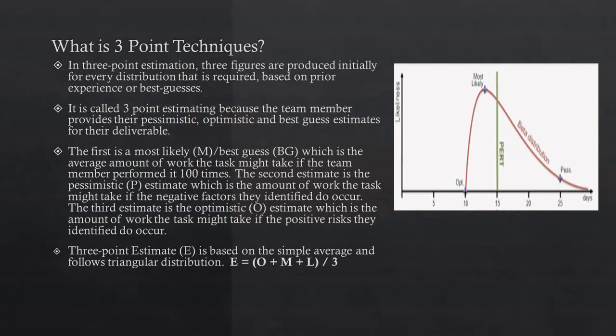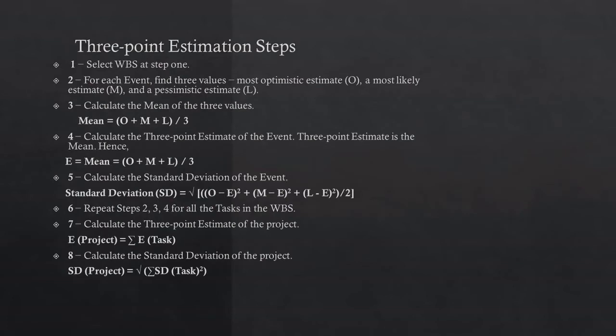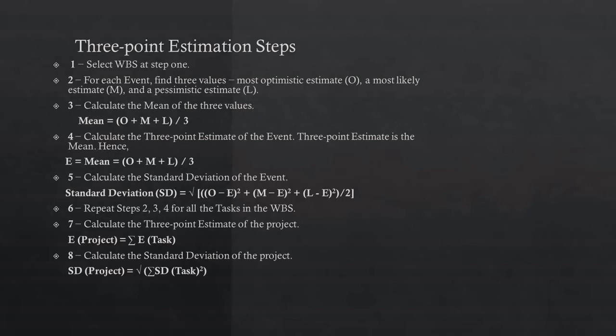Let's see how we can calculate it step-wise. First, select WBS, that is work breakdown structure. Step 1: For each event or each task, find three values - most optimistic (O), most likely (M), and pessimistic estimate (L or P).